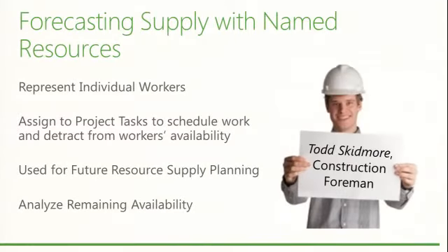To look at your supply, we're going to look at the real people and what is their remaining availability. Basically we're looking at what is their capacity. You subtract out how much work they've already been assigned, maybe on some projects, and what's left is their remaining availability. So these are real people. This is how we're going to model the supply and demand on our resources, and then we can compare them to generate one of those charts with the lines that zigzag across the timeline.